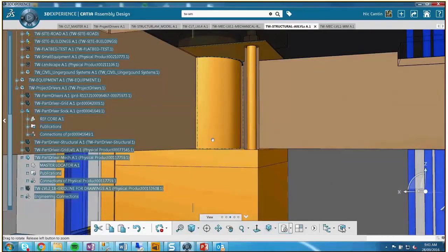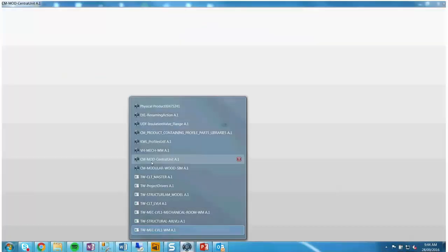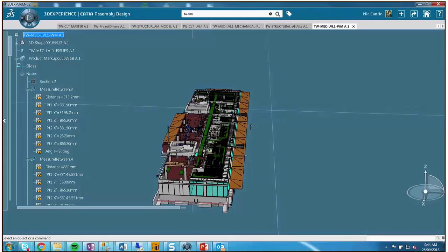But the long and the short of it is, this is the first time this building's ever been built, and everyone was collaborating for sure. They built 17 stories in 9 calendar weeks, and the general comment back was everything just went together really well. They just flew up the building. Near the end they were close to 3 floors a week, so they actually improved as they went up the building in terms of production. They could have gone faster, but they got stopped by not planning for the stud. The inside wall stud was the one that delayed the whole project, just because that was the only thing that was not prefab, done the typical way.